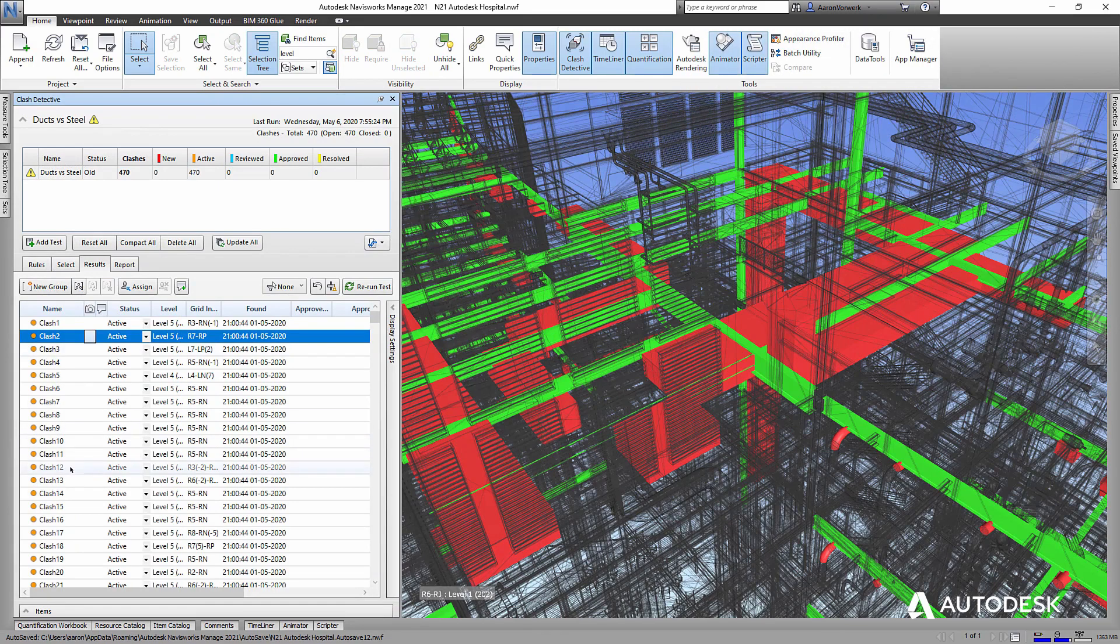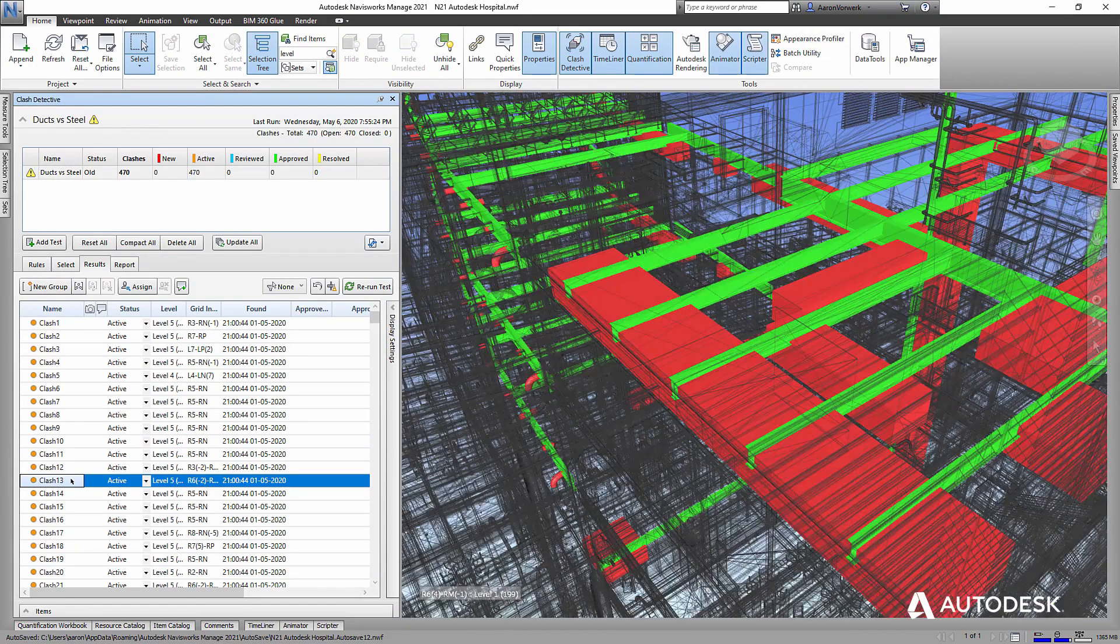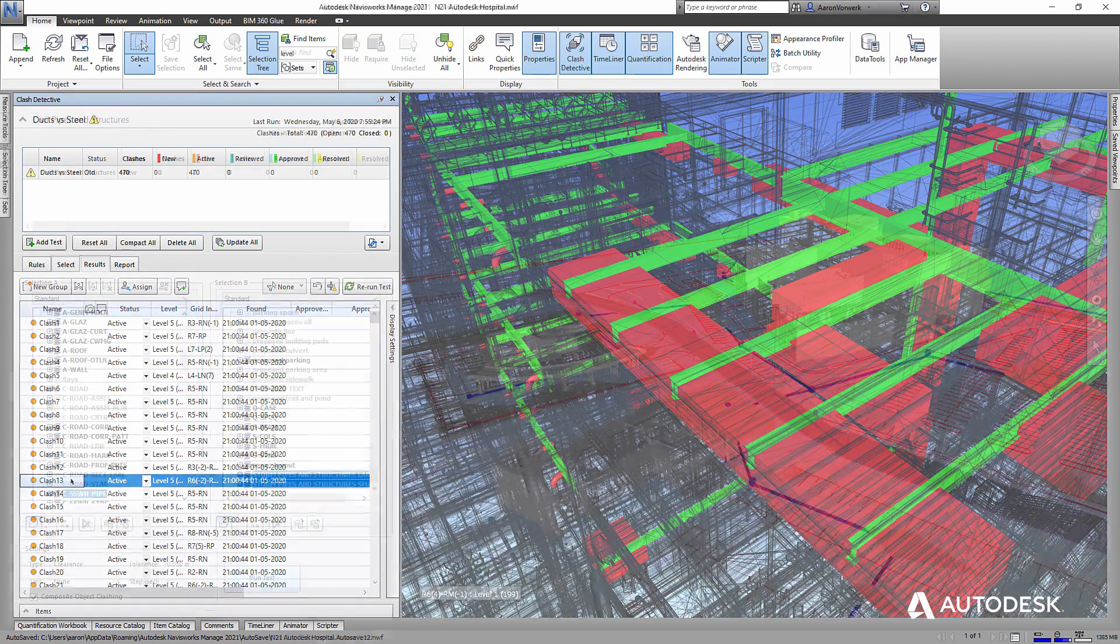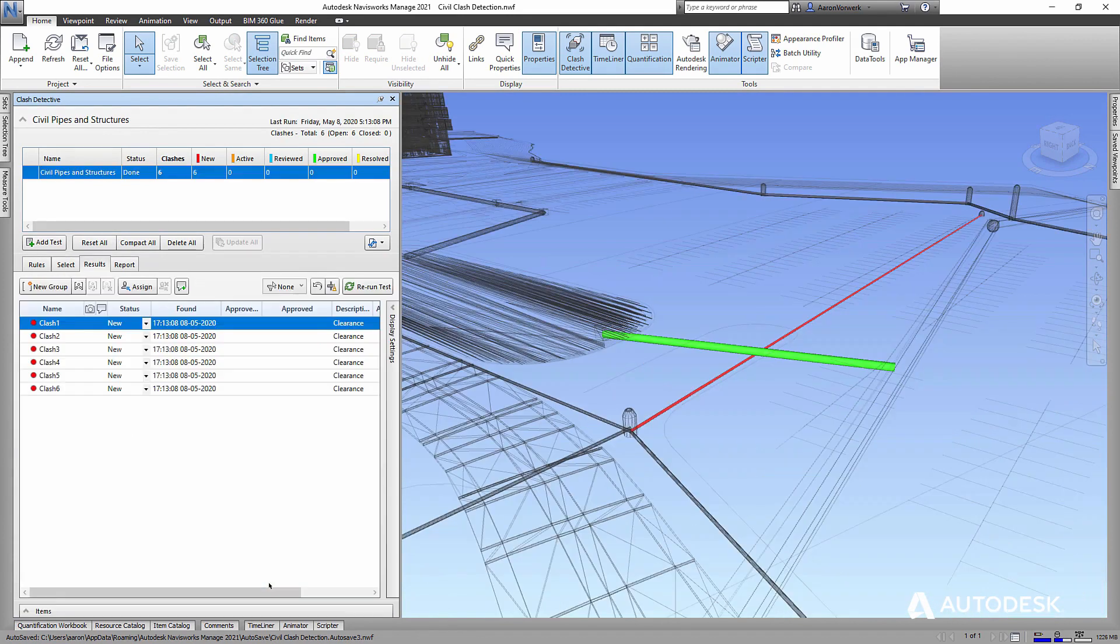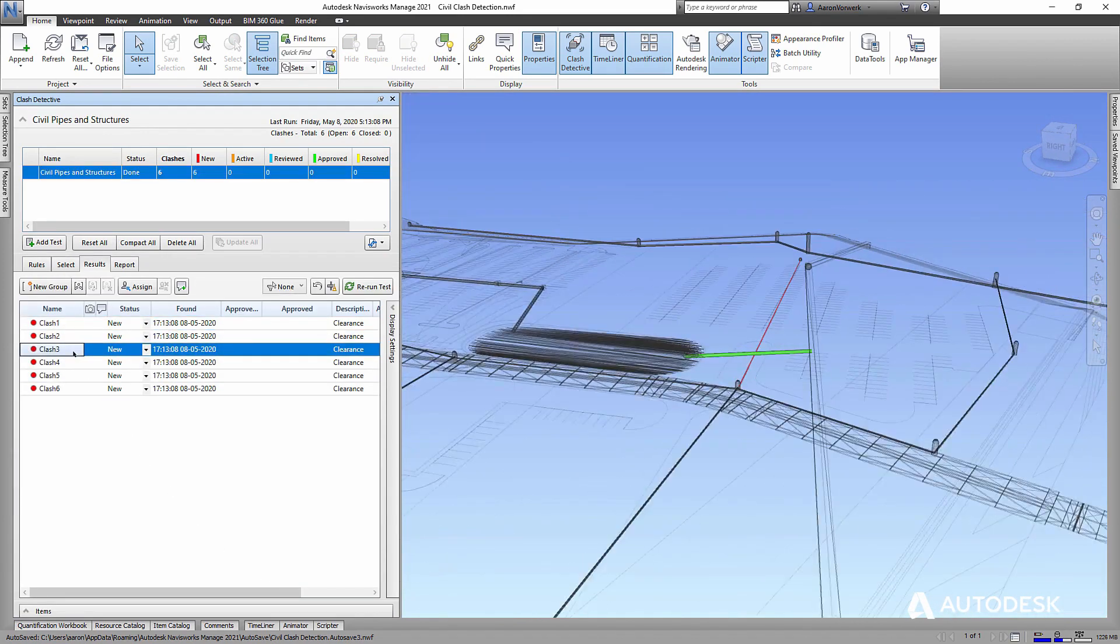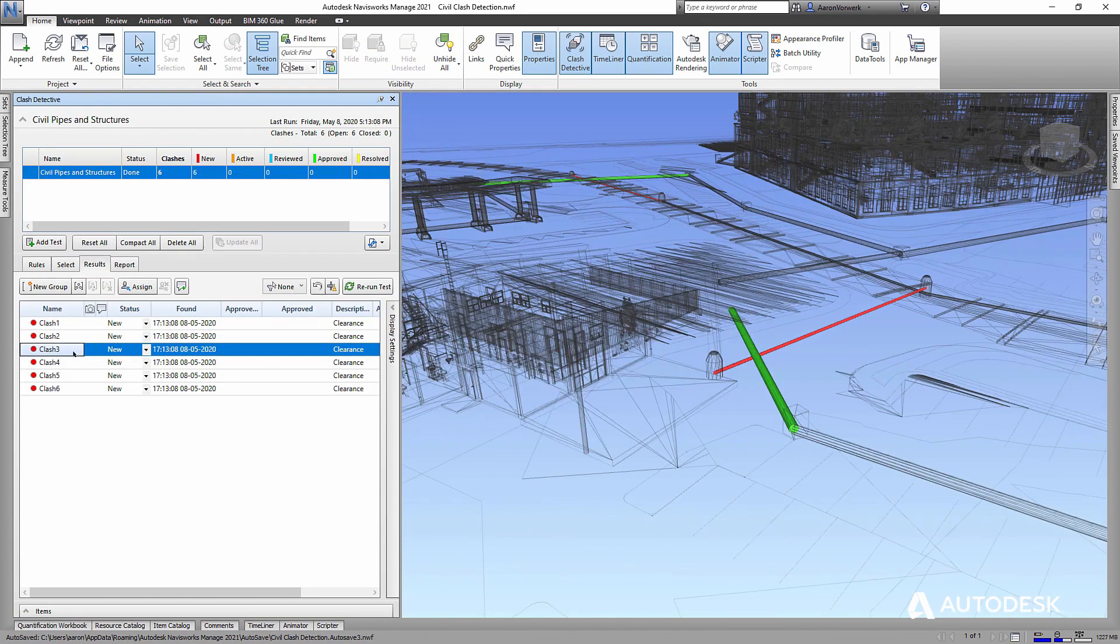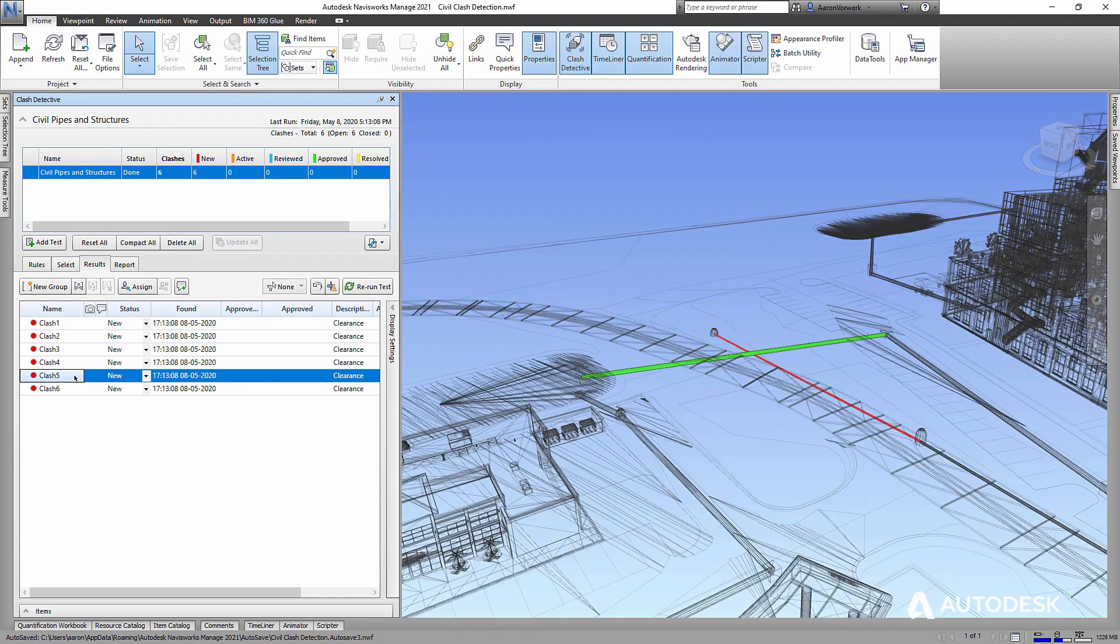Together, the team can identify interferences between steel framing and mechanical ducts in the building, as well as between site utility networks in the infrastructure design, enabling resolution of any issues between design intent, constructability and fabrication before construction even begins.